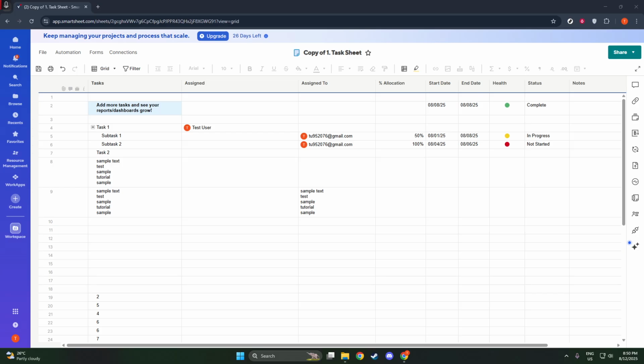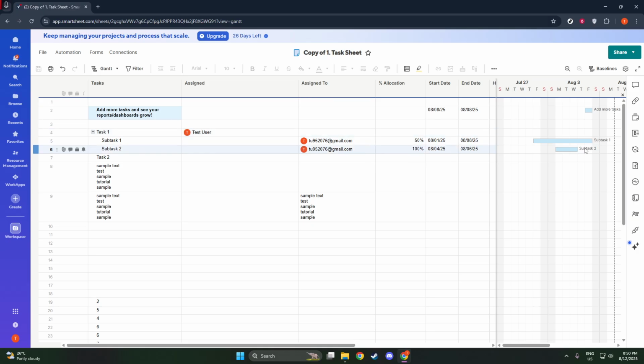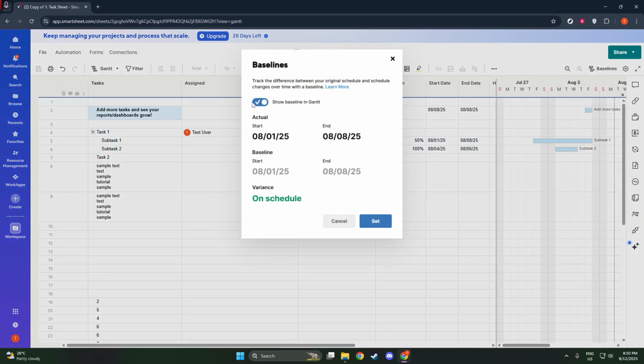this feature. First, make sure you're in the Gantt view of your project sheet. Baseline tools are only accessible within this specific view mode, so you'll want to double-check that you're in the right place. If you're unfamiliar with Gantt views, it's essentially a dynamic way to see your project timelines as a series of bars across a chart, which is ideal for managing and visualizing project plans.